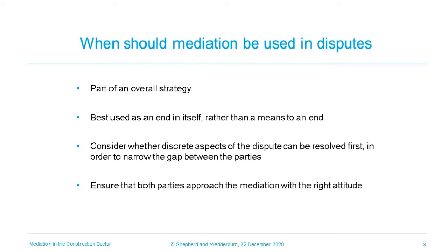So looking at a complex dispute, an adjudication could proceed on a discrete aspect such as an extension of time claim or a loss and expense claim and set out some boundaries for the dispute. This could then lead to mediation on the overall final account, which might have been impossible to mediate while there were extension of time or loss of expense claims on the table.